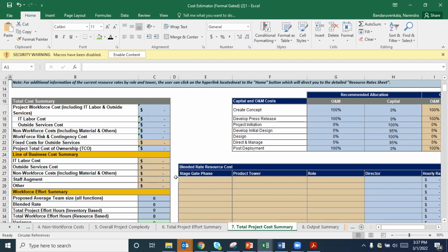So that's how you will be seeing all these calculations happen as soon as you are done with these workforce related roles, the roles multiplied by the number of hours multiplied by the cost built in. How do we get this cost? It is based on our SAP preloaded labor costs. Okay, we have the preloaded approved labor costs in SAP that we pick up from there, and then we load the data here.